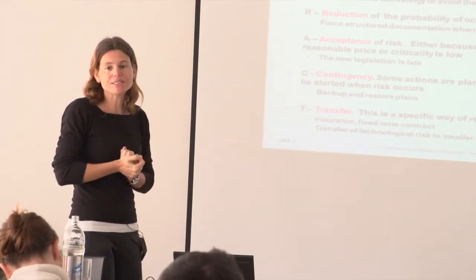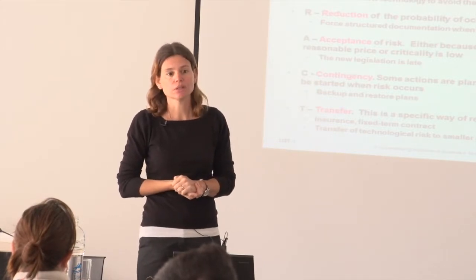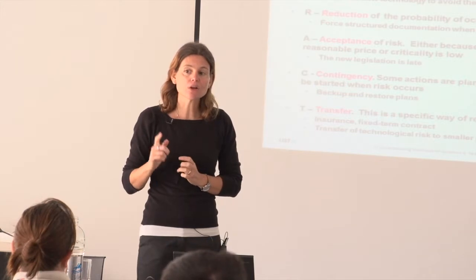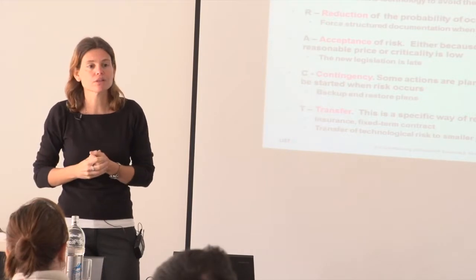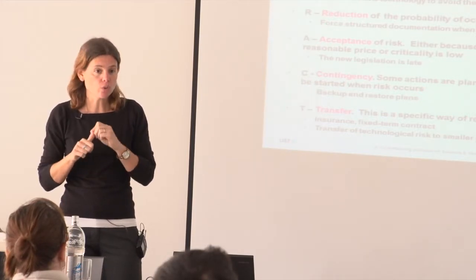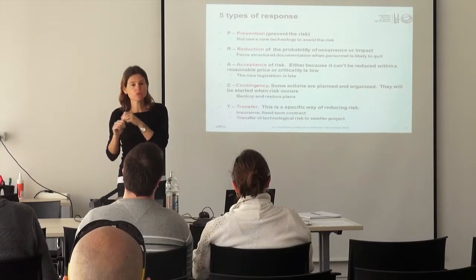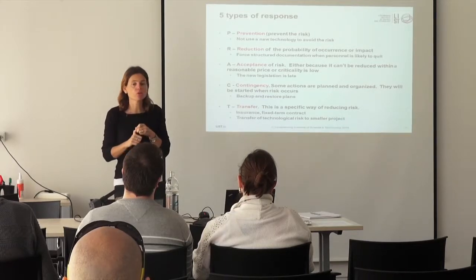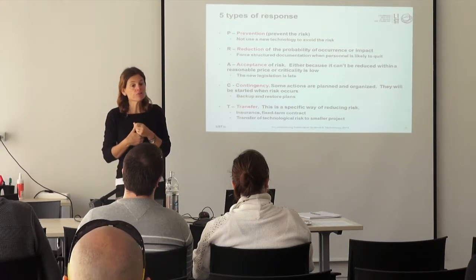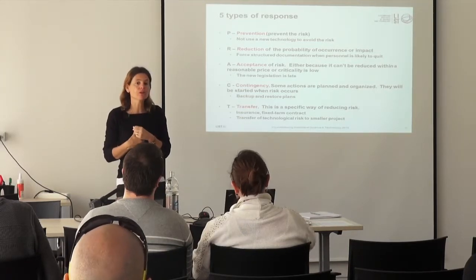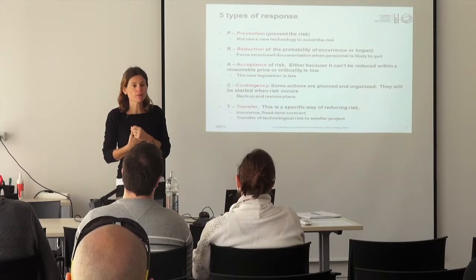One that is quite nice is the acceptance. So one action I can do is say, yes, I accept the risk. But it's not that funny to say, oh yeah, we accept the risk and that's it. One thing is that you are aware of that risk, you have communicated about that risk, and you have decided as a steering committee or as whatever authority, you have decided that you accept the fact that that risk is there. It's really different from not knowing anything at all about that risk and not knowing its impact and not knowing the probability of it happening.